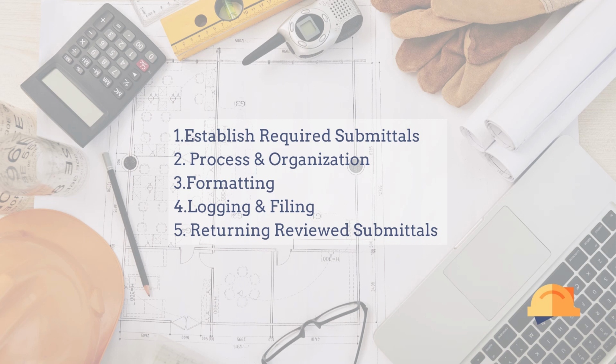Number 4, keep an up-to-date log and the status of items, and ensure that you have filed them for future reference. And number 5, when returning reviewed submittals, track open-ended items and any changes made, as well as include adjacent and interfacing scopes in distribution of the final set.